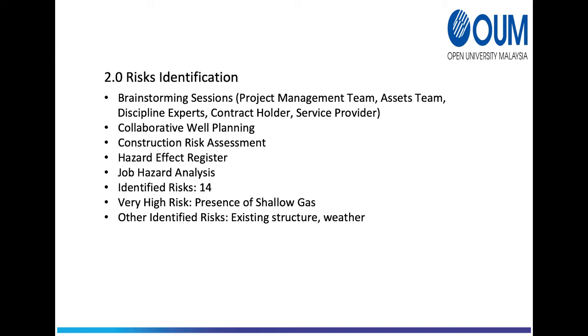Findings from the assessment showed that drilling activities will pose a very high likelihood risk to people, asset, and reputation due to the presence of potential shallow gas at the proposed location. A sample of the CRA for this project is attached in the next slide.